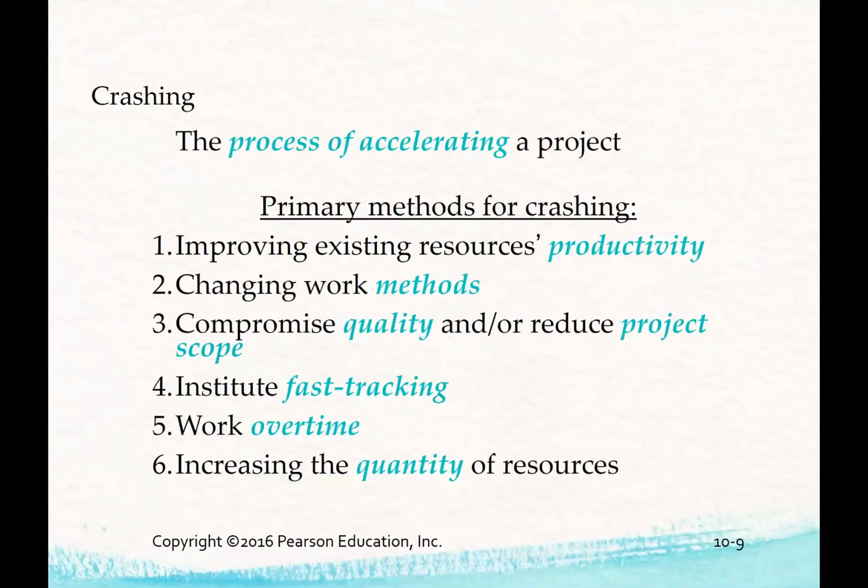And this is a common thing that happens, but what ends up happening is that project managers don't actually spend a lot of time calculating, figuring out what the result is if we actually have to look at reducing those activities on the critical path. A lot of times all we do is go, okay, we can just add more resources, we can just add overtime, etc. But all of those things come with a cost. And it's communicating that cost back to the client which sometimes gets lost.